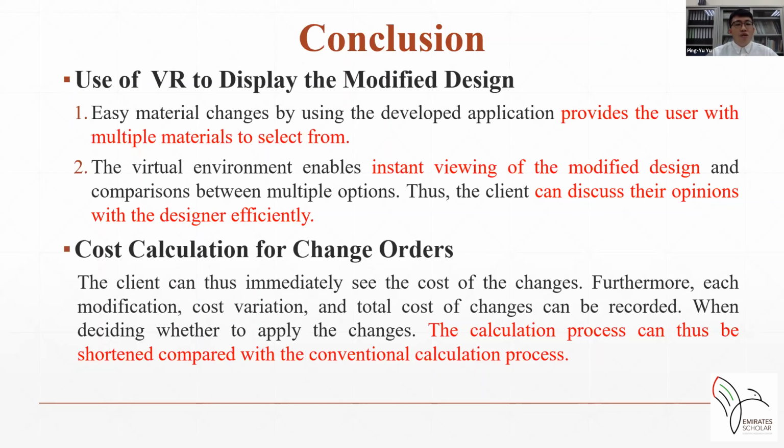Final is cost calculation for change orders. The client can thus immediately see the cost of the changes. Furthermore, each modification, cost evaluation, and the total cost of changes can be recorded when deciding whether to apply the changes. The calculation process can thus be shortened compared with the conventional calculation process.